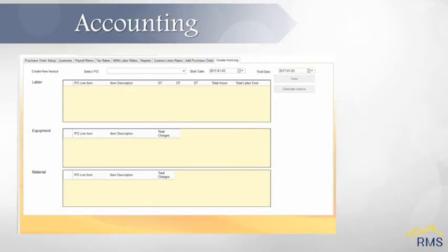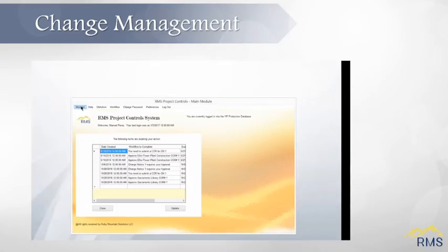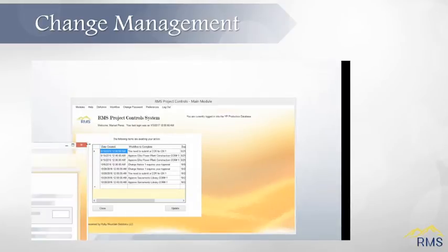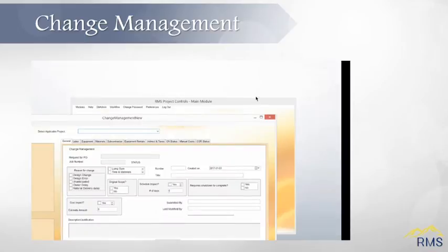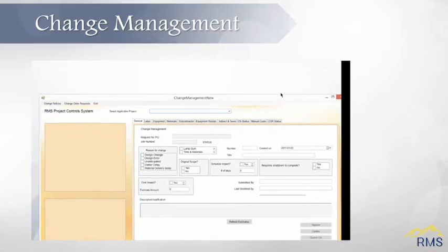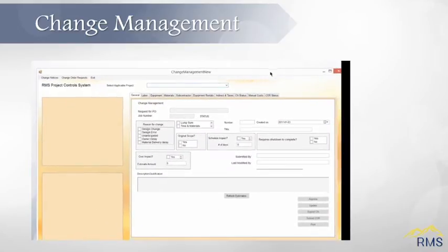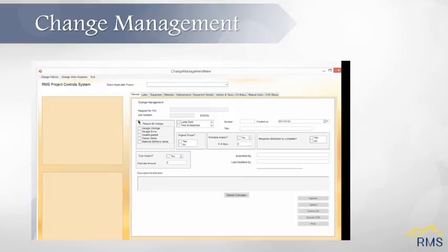In a perfect world, project specifications and worksite conditions will not change. Real projects will go through changes due to design changes, issues with equipment and materials, weather, and many other reasons. It is important to document in writing and get approval for all changes in a project, regardless if they involve cost or schedule changes. The process of change management involves the creation of a change notice to let the customer know of a change in the scope of work or deviation from specifications.